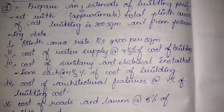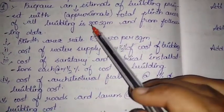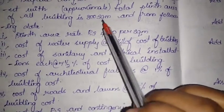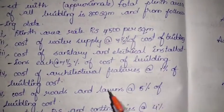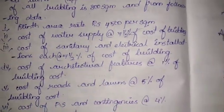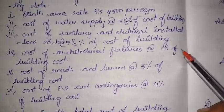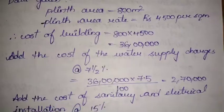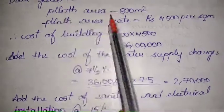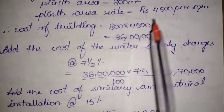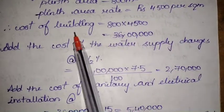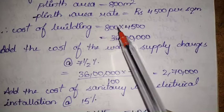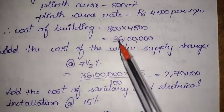Now for the solution: we are given the plinth area of 800 square meters and the plinth area rate of 4500 per square meter. The total cost of building is simply the rate per square meter multiplied by the total area, and that gives us the cost of the building.